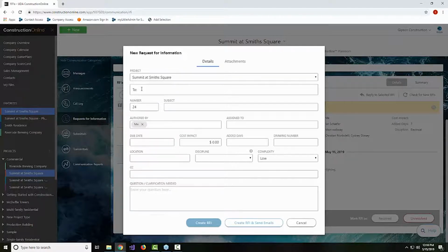To will be all the people who are contributing to the conversation. So again, this is kind of like the proctor. This is the person who's orchestrating this series of questions. The Assigned To represents that person. To would be all the different participants. CC would be the viewing audience, if you will, all the people who might need to follow along to see what's happening.